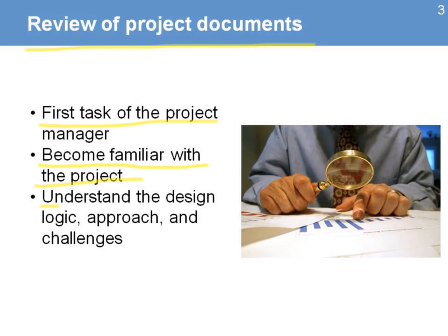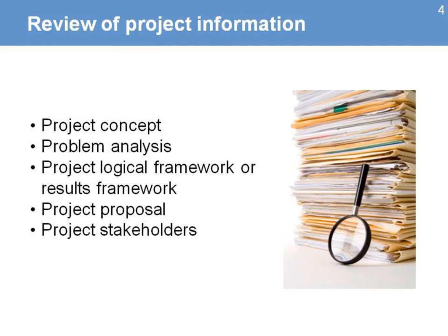You have to have a good understanding of the design, the logic, approach, and challenges. To do that, you need to review all the project information that is available to you. You have to look at the project concept, the project analysis, the project logical framework or the results framework. You look at information on the project proposal and also information on project stakeholders.